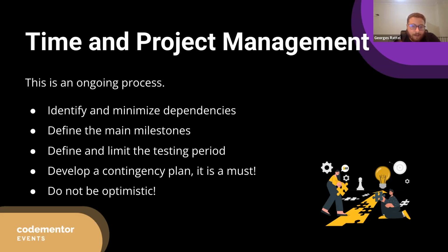And this is very, very important to be defined and for the client and developer to be aligned on, and not to leave testing till the end of this period. It's important to start testing as soon as possible, even if it's testing small components, because the sooner the developers get feedback, the faster they can solve it and integrate it in the milestone itself and release faster.